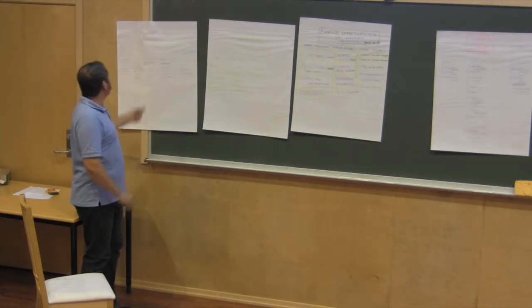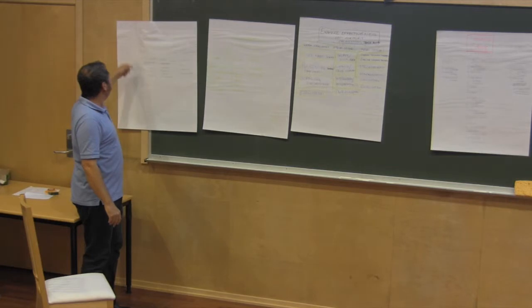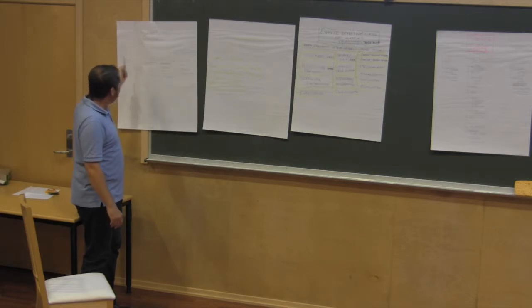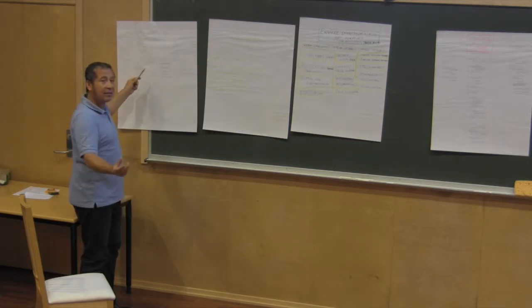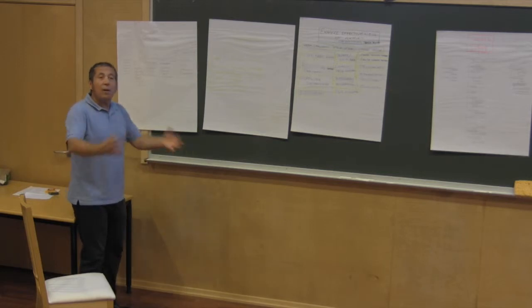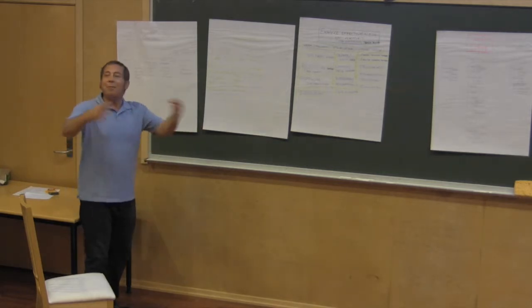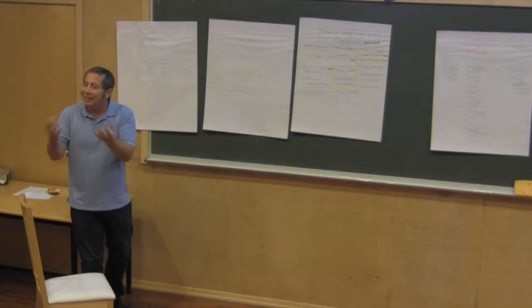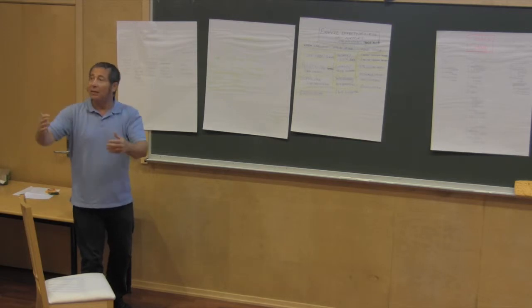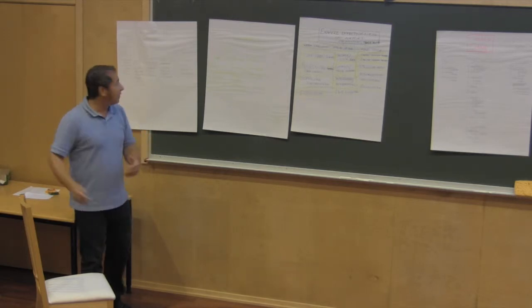And the pilot phase. Actually, this research and development maybe was not in the pilot phase. It was actually identify user need, safety and risk. This is the pre-project. The pilot is just testing, finding out what are the risks associated with implementing this part. So here you see you are combining many things in one place, which makes the readability hard. Split. When you are able to split to sub-deliverables, do that. It enhances and increases the readability.